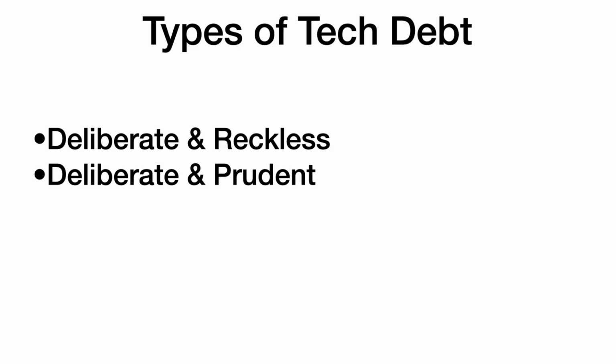Let's say you are doing a tight deadline project. It may result in some last minute issues, or it may take a longer time to implement new things later because your code is not in a proper scalable format. So you know all these things, and you take the decision to prioritize speed over quality. The team decides the debt is acceptable if the payoff for an earlier release is greater than the cost of the technical debt.